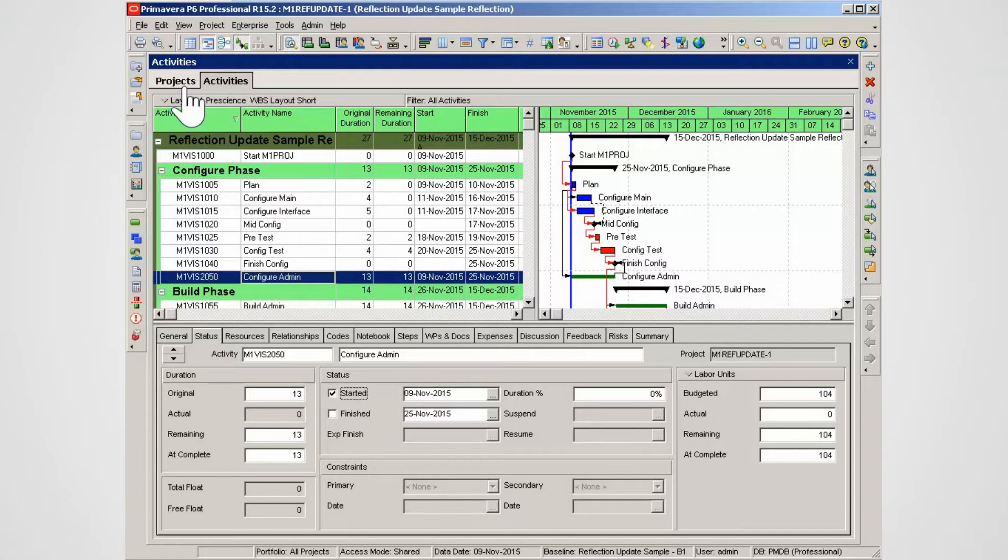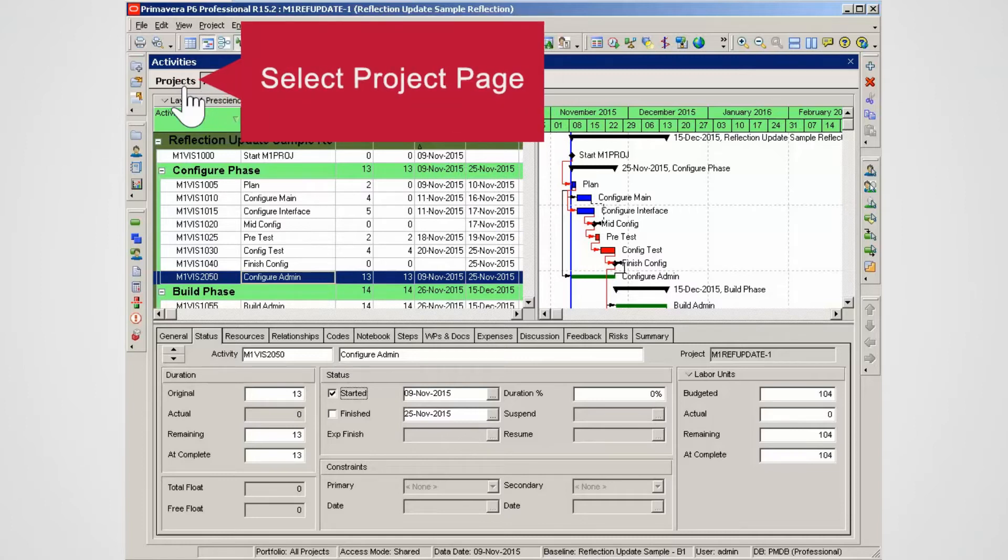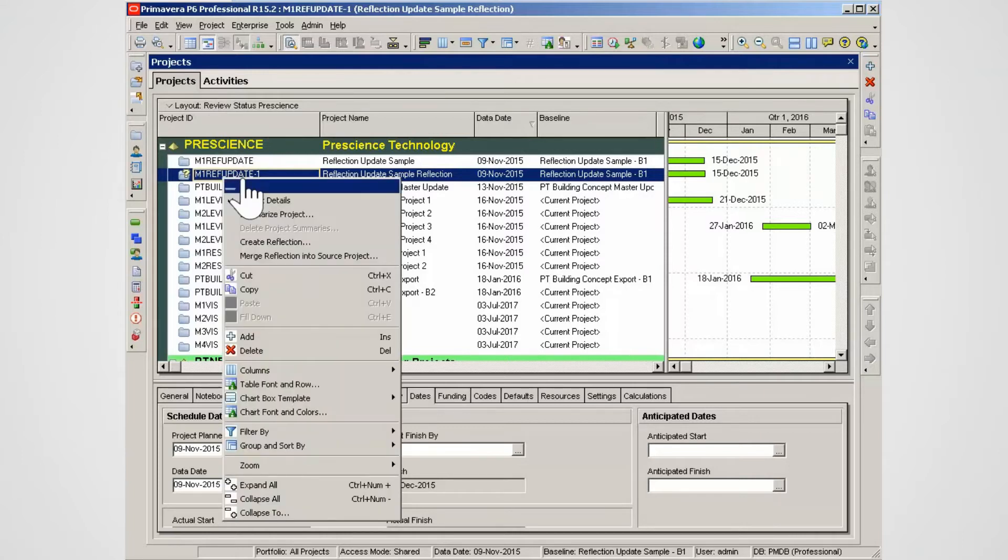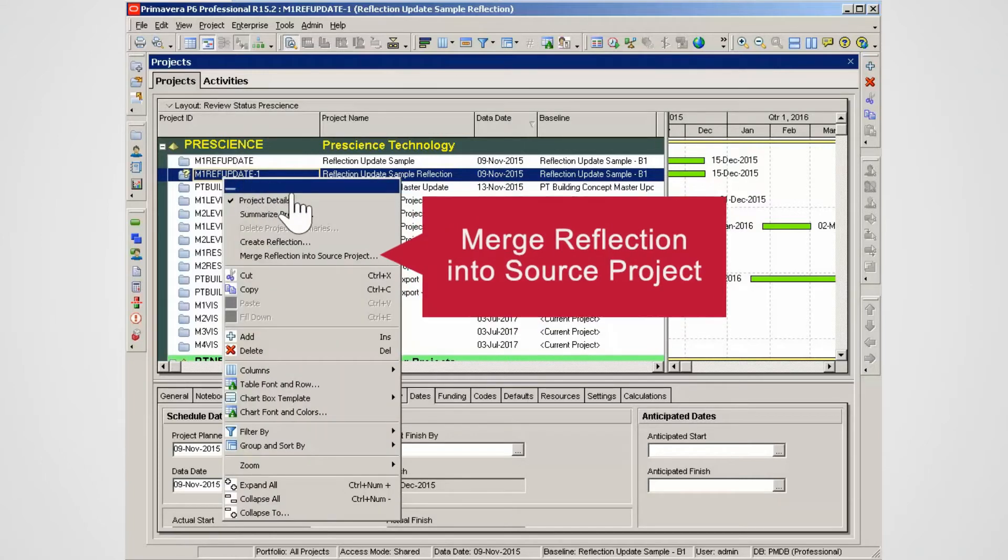Return to the project page. On the project page right-click on the reflection project. To start the update process select merge reflection into the source project.